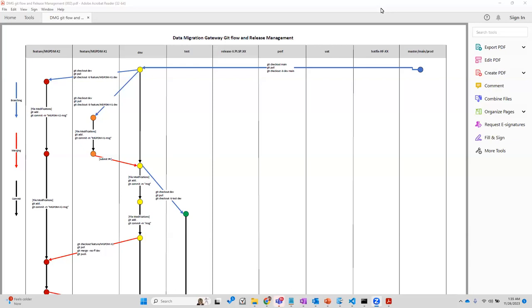Like, I want to build a data mart, I want to build a retail sales data mart. It's a component of our project, right? Now that's the epic. Now to build the sales data mart, what do I need? So I will write all the stories. For example, I want to have connectivity with the data lake. I want to set up the infrastructure for data lake. I want to set up the access for developers. Then I want to develop the job for landing or transformation job or something.